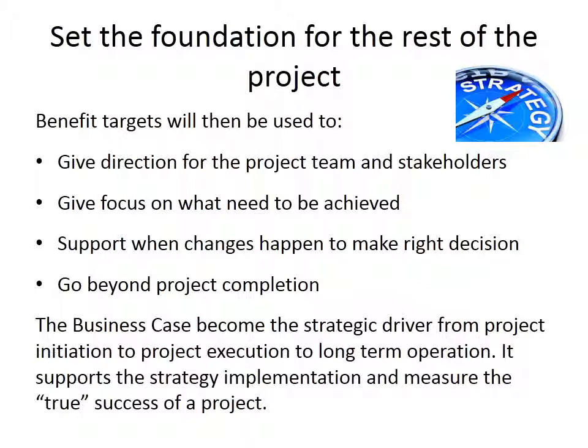And it goes, of course, beyond project completion, because often the benefit is also realized post-project completion. It's once the ERP system is running and it's been running for a few days, months, that we can actually realize the benefits. It's once, for example, my internet banking phone application has been downloaded by a number of people that you can actually see the benefit realized. So it really helps you to capture this value after the project is completed. So we really have the continuation from pre-project in the business case, throughout the project, and post-project. And that will make your business case become the strategic driver all throughout the project life and post-project life, actually.